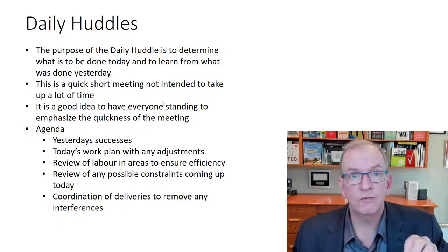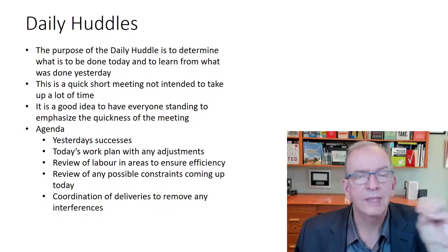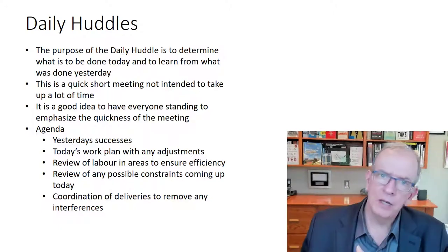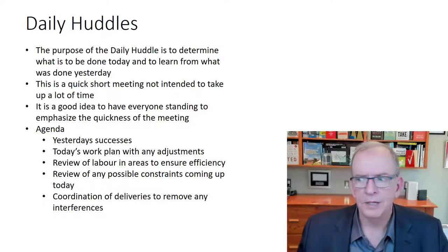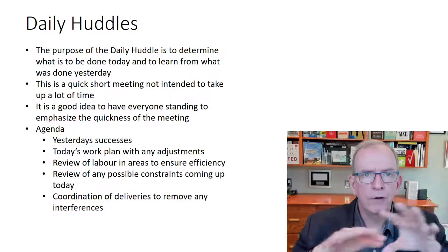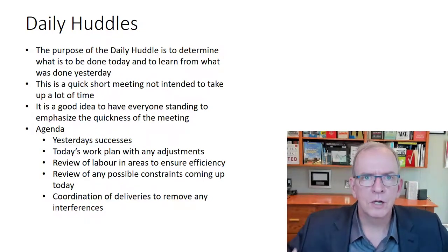Now, to be successful, you better make sure that when you're procuring the work with the trades that are going to be involved in this, they understand what they're committing to up front, that there's no surprises, because otherwise you're going to get this feedback: I've always done it this way. This is going to take too much time. I didn't price for this. And you can expect that you get a lot of pushback. You want to be upfront about this and provide training upfront so that there's a good, clear understanding.